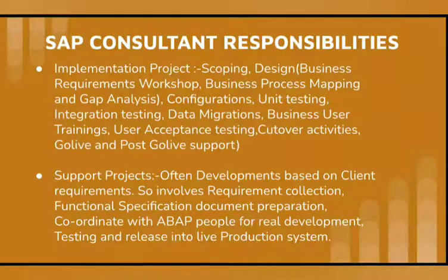Also we need to highlight the standard SAP process and try to map the business requirements with it. If 80 percent of the process is mapping and the remaining 20 percent is not mapped, we need to perform the gap analysis on how we are going to map the 20 percent of the business process not covered in standard SAP. That gap can be covered through developments. Everything will be covered in the business process document.